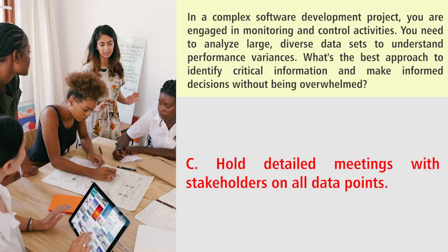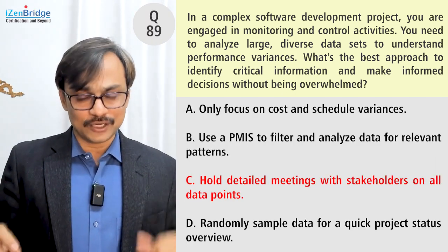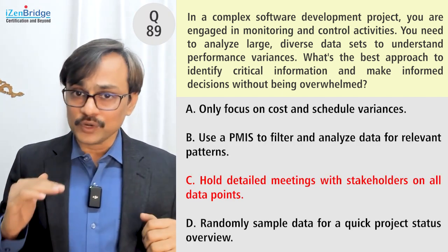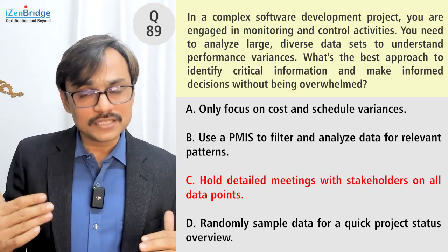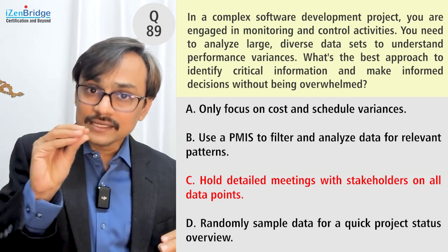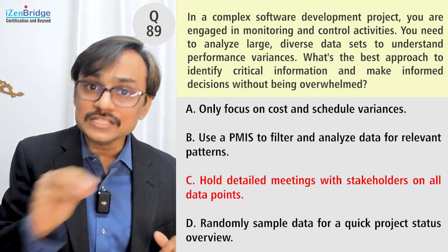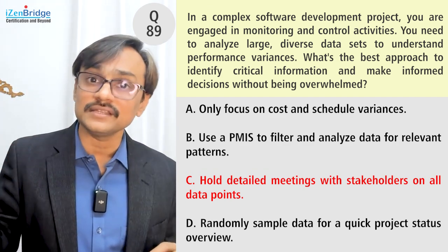Option C, hold detailed meetings with the stakeholders on all data points. When the question is already saying you have a diverse data set, and we have a general understanding that stakeholders are interested in high level information, milestone level information, the trend level information rather than the detailed data.